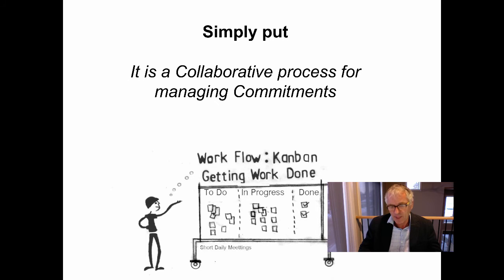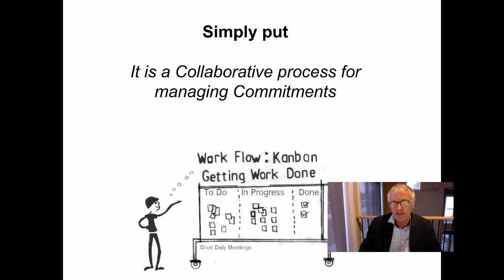At the daily stand-up meeting, trades meet to report on work commitments that have been achieved, to resolve any issues, and to coordinate the planned work for the day. The percentage of work commitments achieved is tracked at this daily meeting and summarized as the main performance indicator for how well the team is at making and keeping commitments to the overall phase plan.